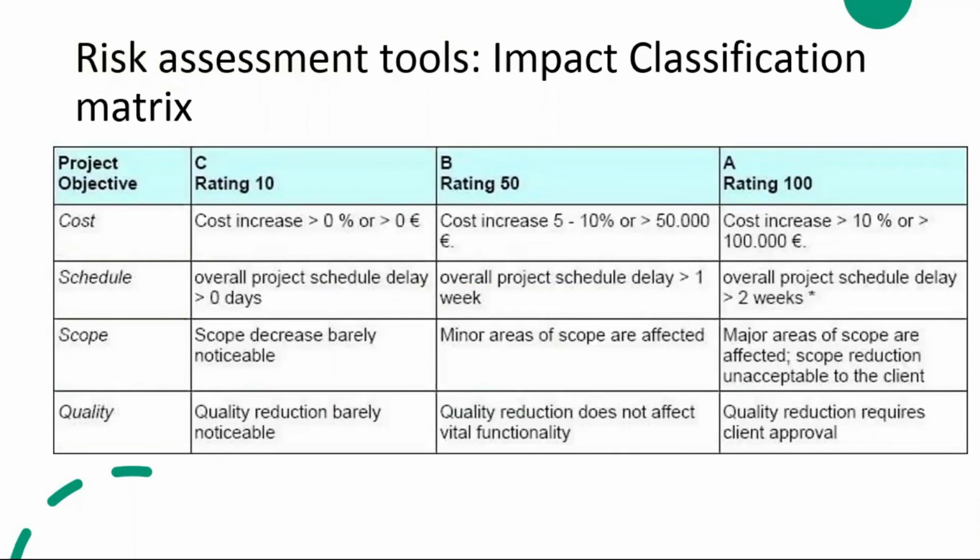The score represents bottom thresholds for the classification of risks, assuming normal conditions. An upgrade of the score to the next or even next +1 level is necessary if the risk is impacted by critical factors such as how important the specific stakeholder is, whether the project is critical for the further development of the relationship with the stakeholder, the risk is already in the focus of the stakeholder, specific penalties for deviations from project targets are agreed in the contract with the stakeholder.